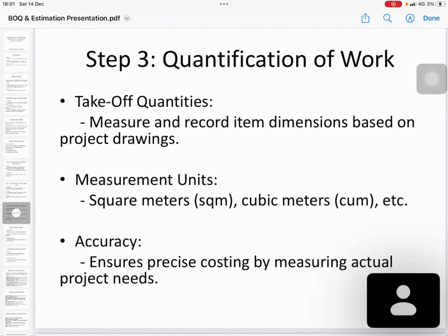If the quantities exceed 10%, you have to go for higher approval. And also if the project cost exceeds 10%, then there is a problem, because you have a limited budget. Sometimes you have to go to the government project cabinet to get approval for the actual cost exceeding the budget.